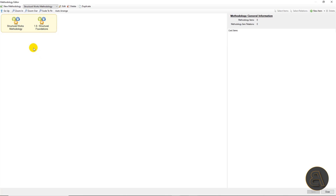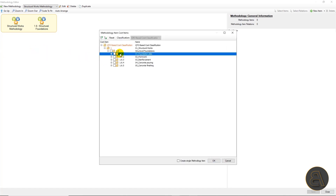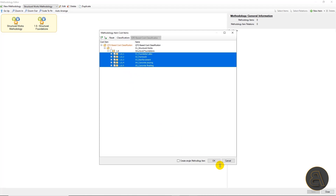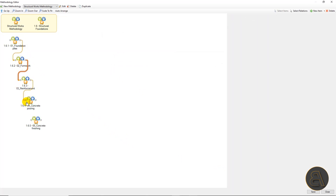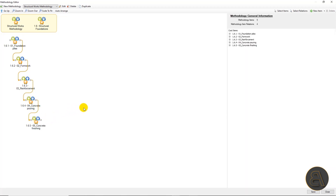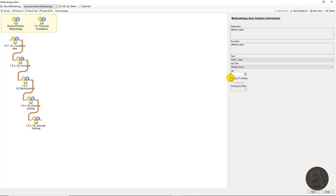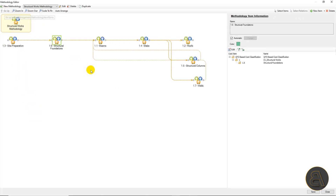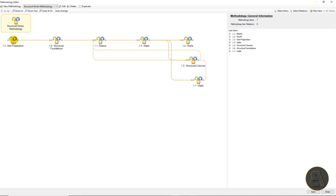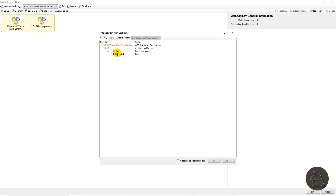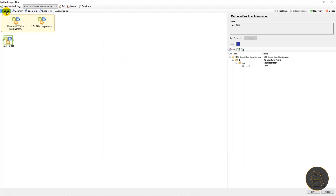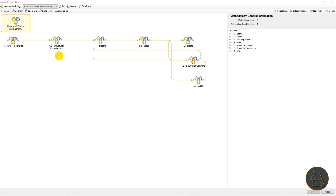By double-clicking on a methodology item we'll access its second level. Similar to the first level, we'll define additional activities — for structural foundations in this case. From the cost classification we'll check all activities related to structural foundations and simply connect them with finish-start relations. We'll also select all relations and check the copy to children option. We need to define a second level for all methodology items, even those that don't have defined second-level activities. For example, for site preparation on the second level we'll just select the same activity as on the first level. To save some time I will skip adding second levels to all methodology items and just show you the end result.